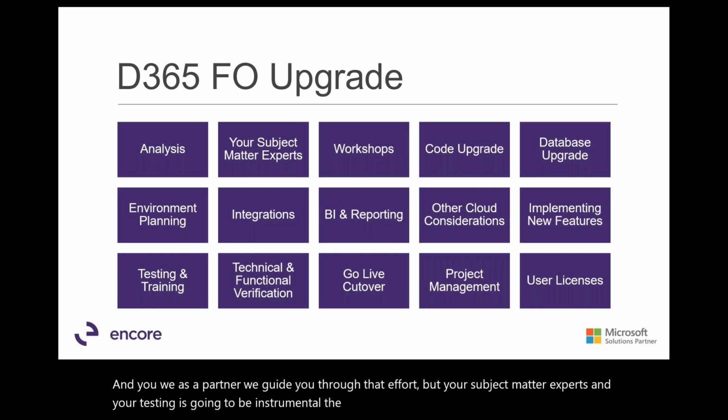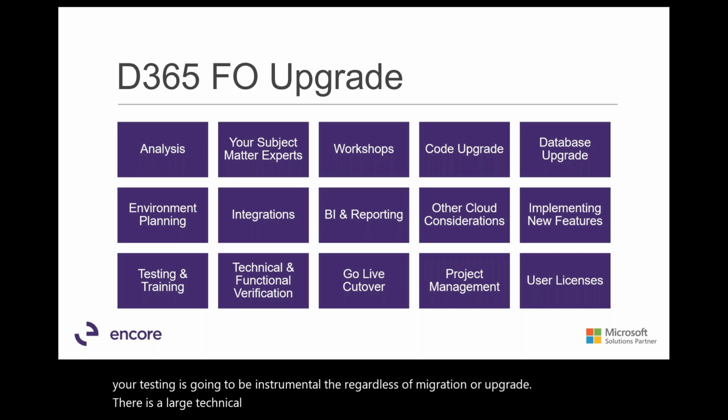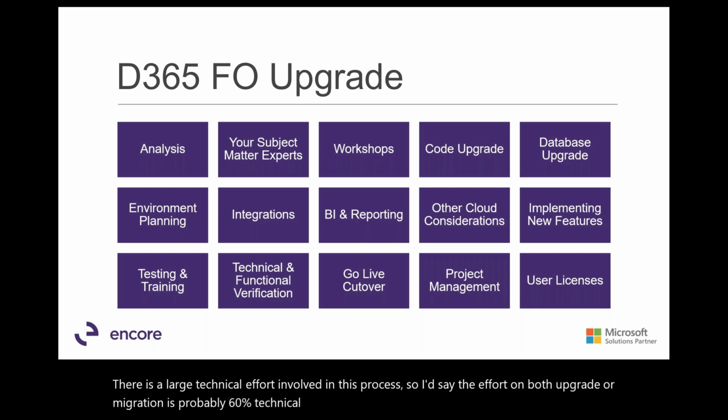Regardless of migration or upgrade, there is a large technical effort involved in this process. I'd say the effort on both upgrade or migration is probably 60% technical and 40% functional. I think that's probably a good rule of thumb.